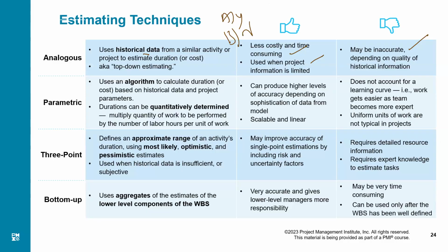B. Okay, the right answer is also B, because there is no analogy. These are two different things. Even though it's an IT lab, the way you will set it up for an IT company, or a construction company, for example, or in a school may not be the same. So you are basing it on a wrong analogy, so it can be inaccurate.